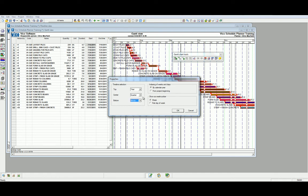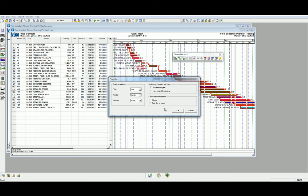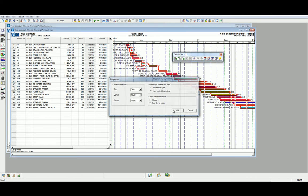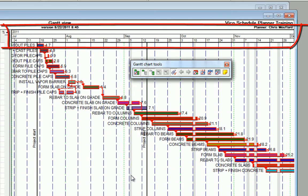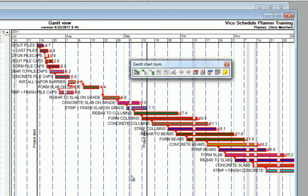However, when we're looking at the management or tactical level of the schedule, I recommend using the month and the week and starting from the first day of the week. Keep an eye out for what happens when we click OK and we're looking at the top of the schedule. We have changed from total number of weeks in the year to the beginning of the week in the month.